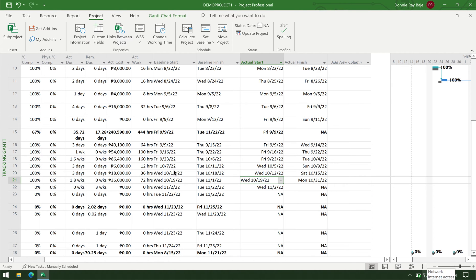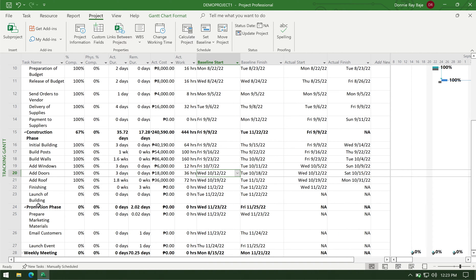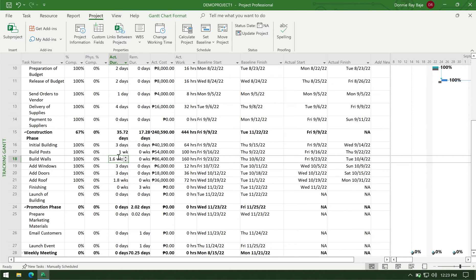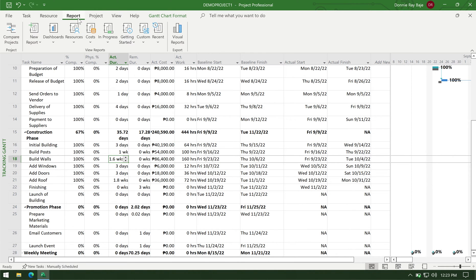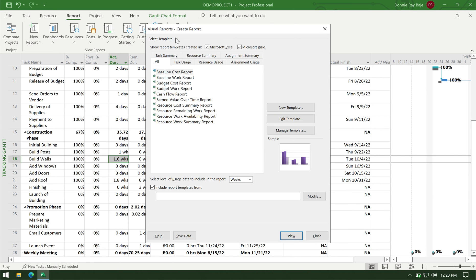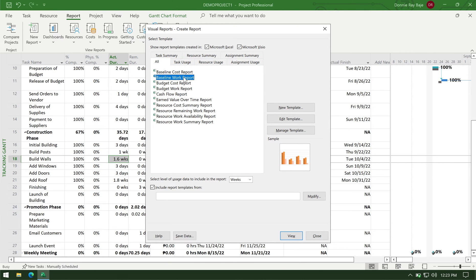And now that I have all the columns and I know an important detail, I can now go to the report and then go to visual reports. This will produce a pop-up where you can generate reports. And I'm looking for baseline work report. And then I have to click edit template.